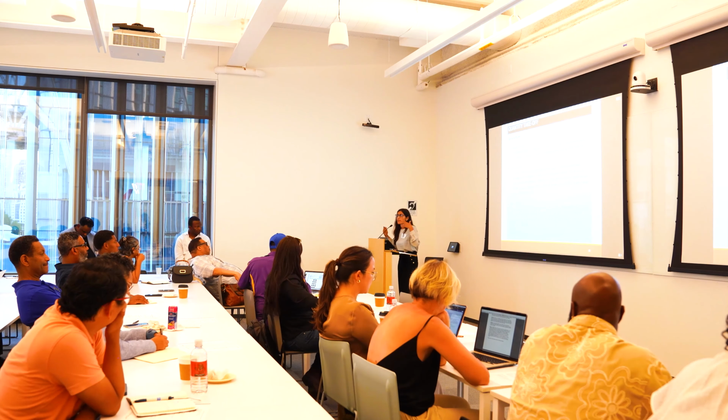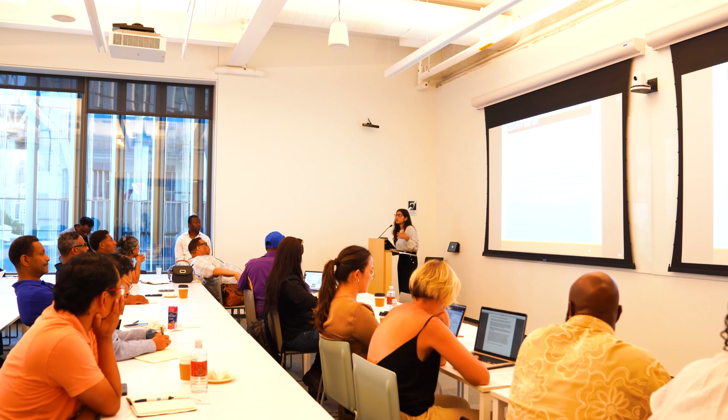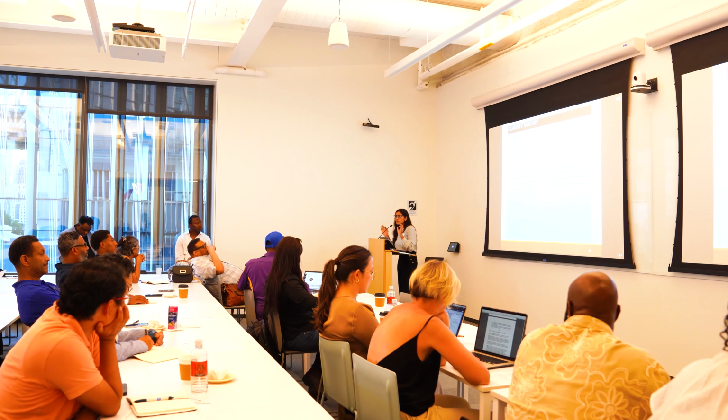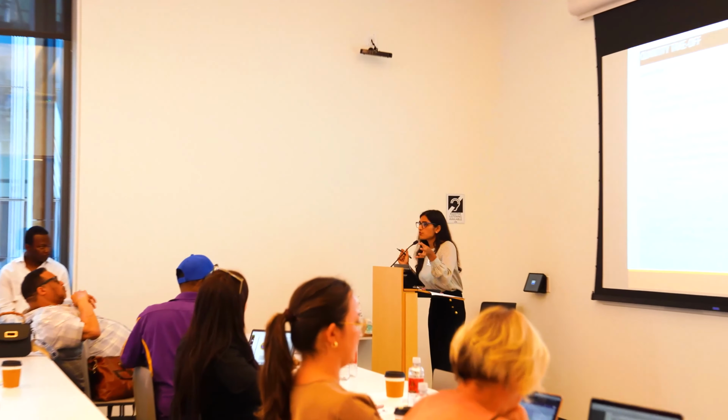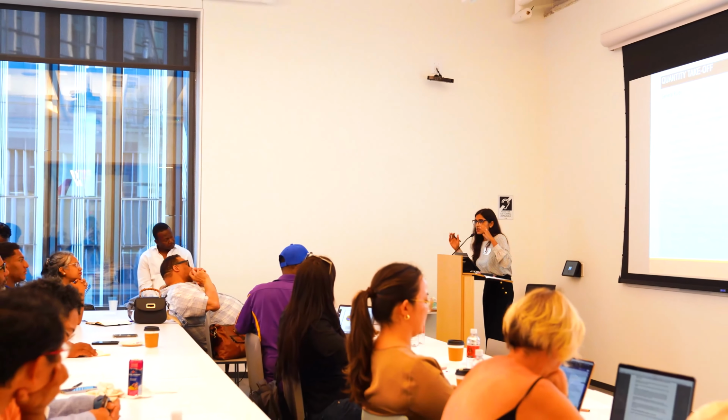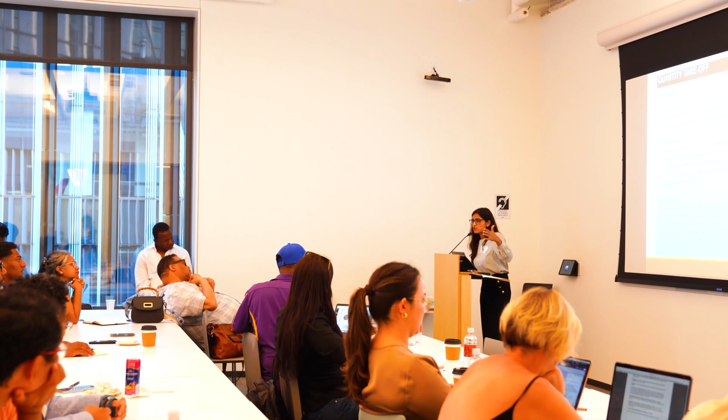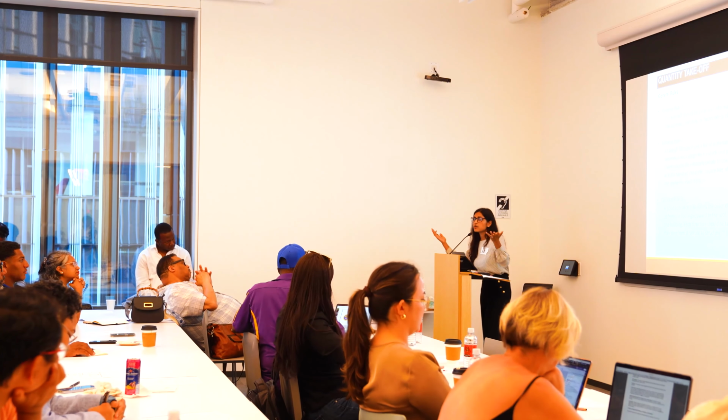Also try to identify things with different colors. Don't make every wall blue or every door that you're counting the same color; try to identify them by different colors. And if you're working with multiple floors, and there is a specialty item that you have picked up, note it, like, okay, I saw this on the roof or I saw this in the basement, because after 50 pages of takeoffs, you're not going to remember where you picked that up.